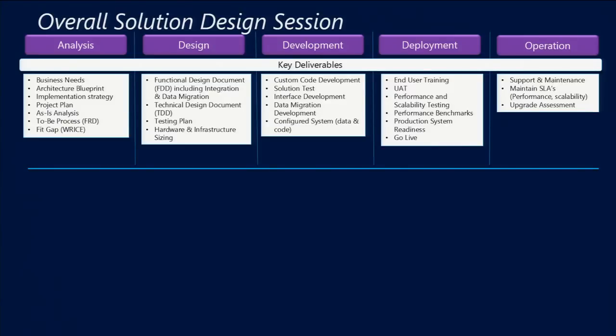Yeah, the code speaks for itself, right, is the common thing that we hear from development. And I can tell you from practice, even internally in Microsoft, it doesn't. You need to go through that process, and in fact, you should have a level of discipline of what happens on the approval side. As I showed you earlier, we actually go in and do the review. It's not about us doing the review, it's having the discipline in there to make sure that's done. So when you have critical customizations, you need to make sure that you have that internal review process. Whomever that is, that's appropriate, whether it's a solution architect or a development lead, you need to have that in the process. The only way to do that is through the documentation.